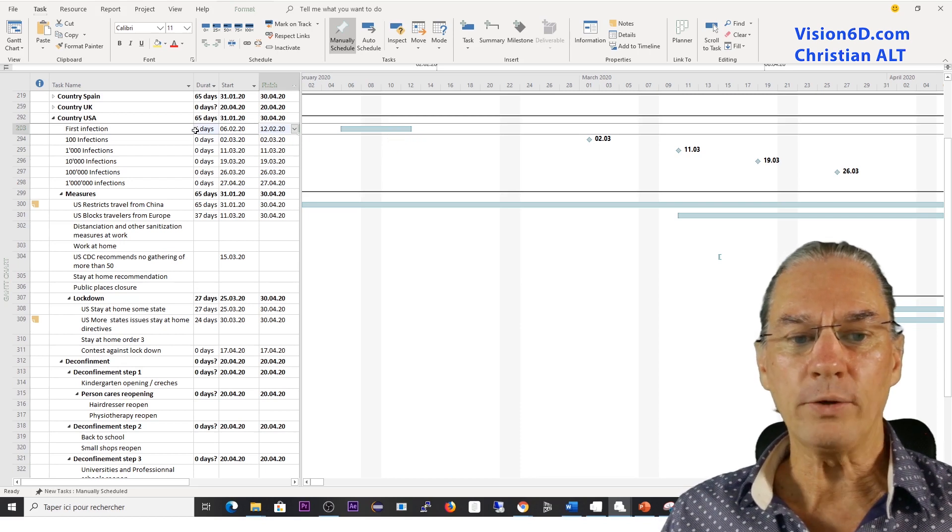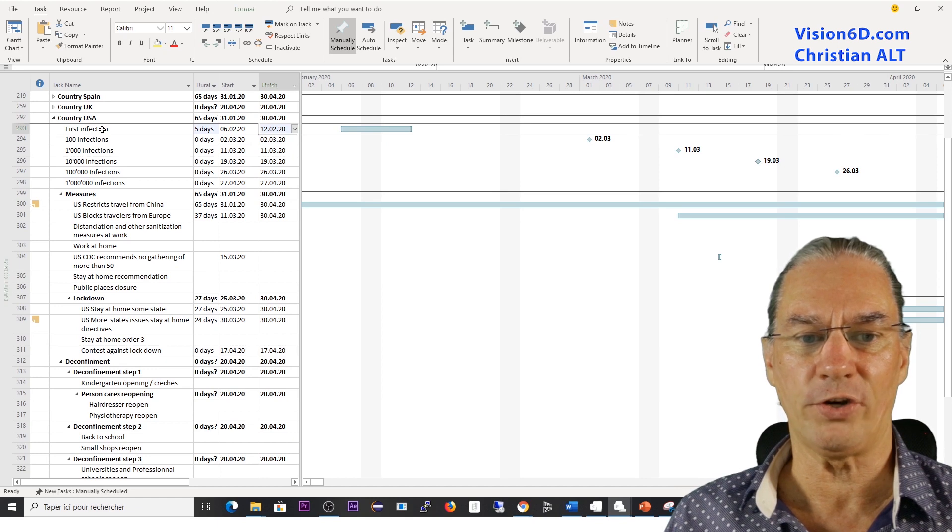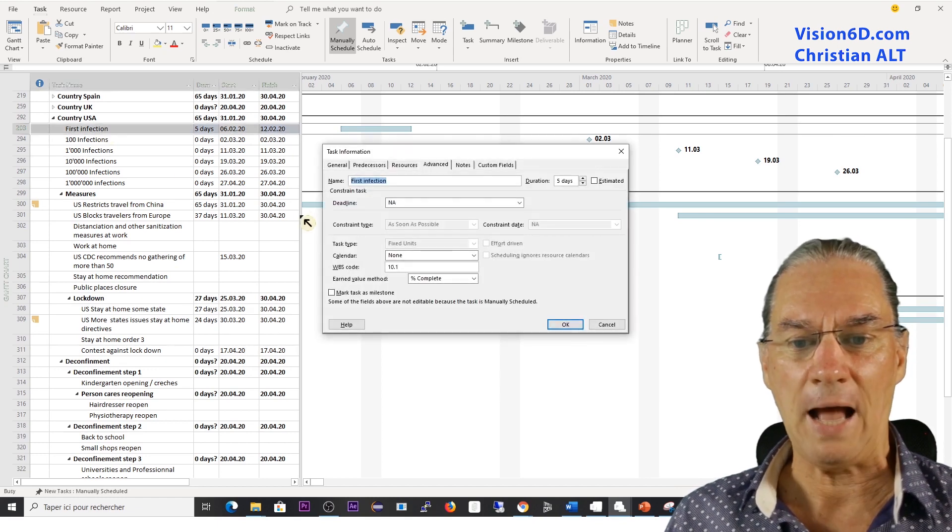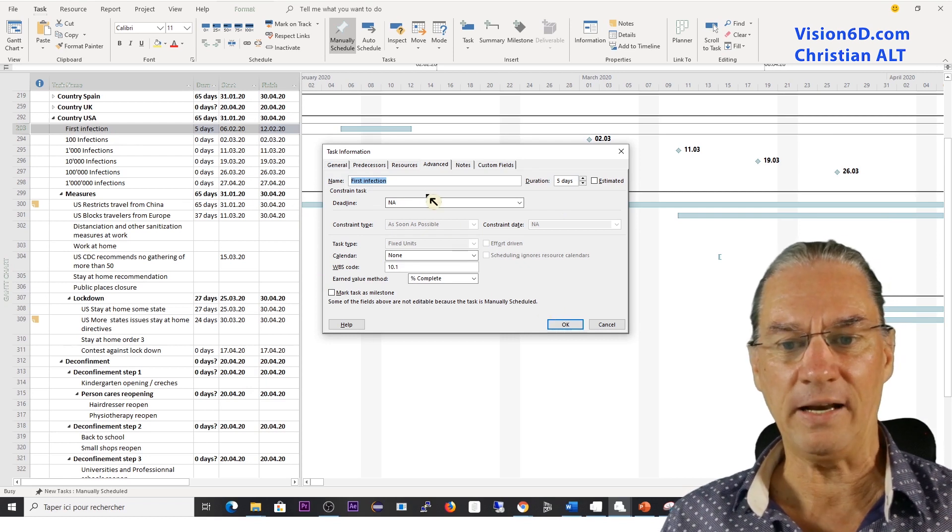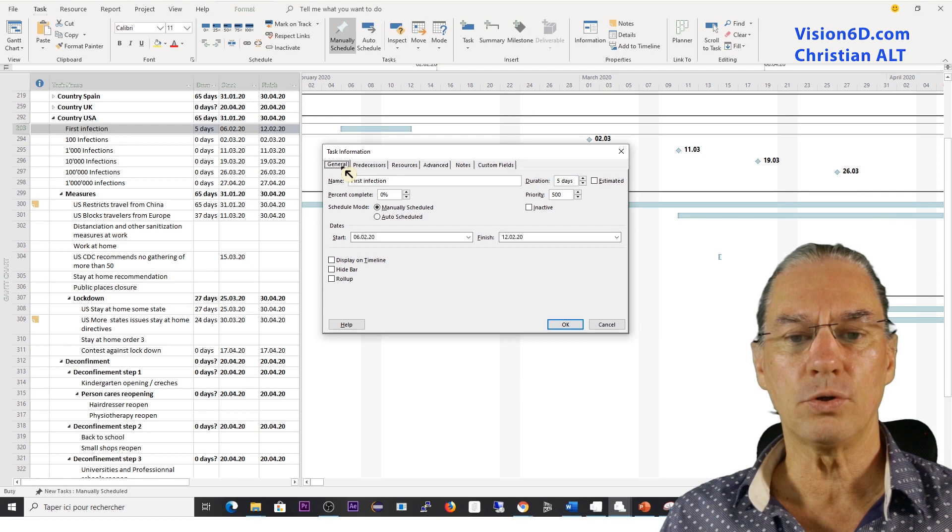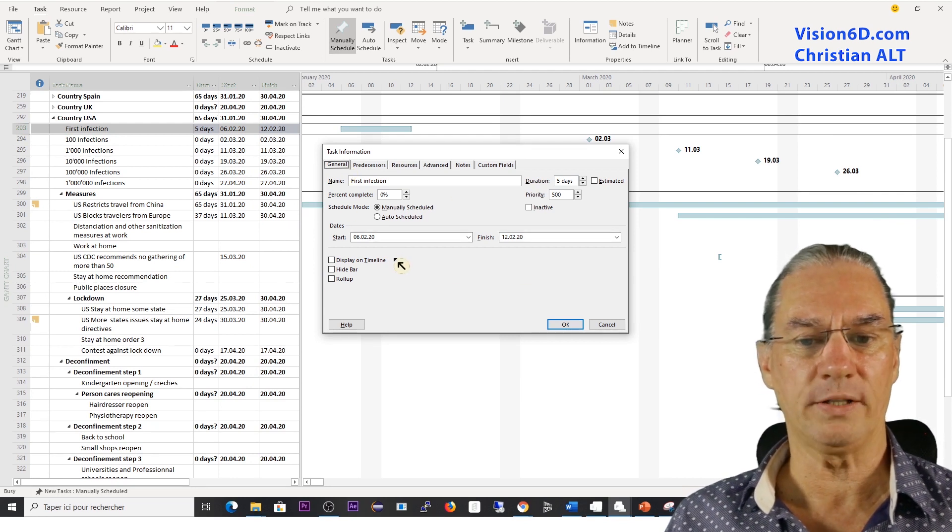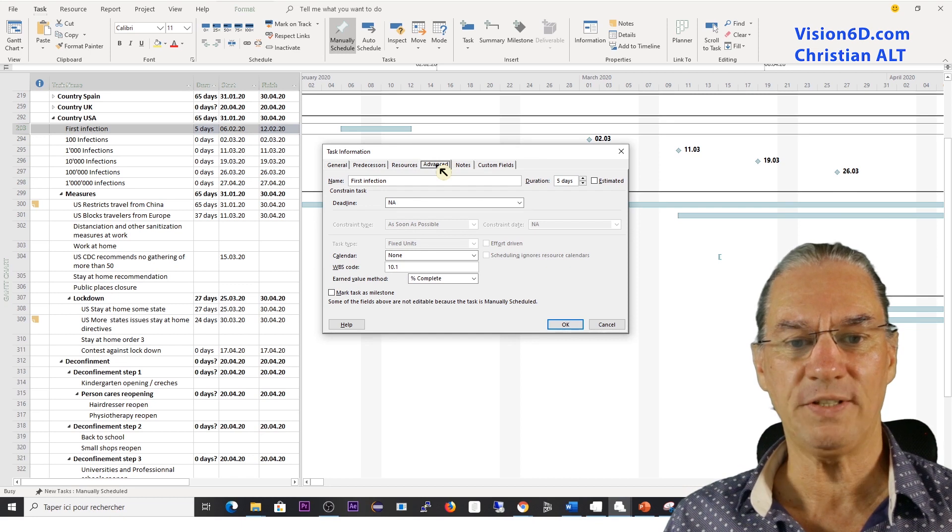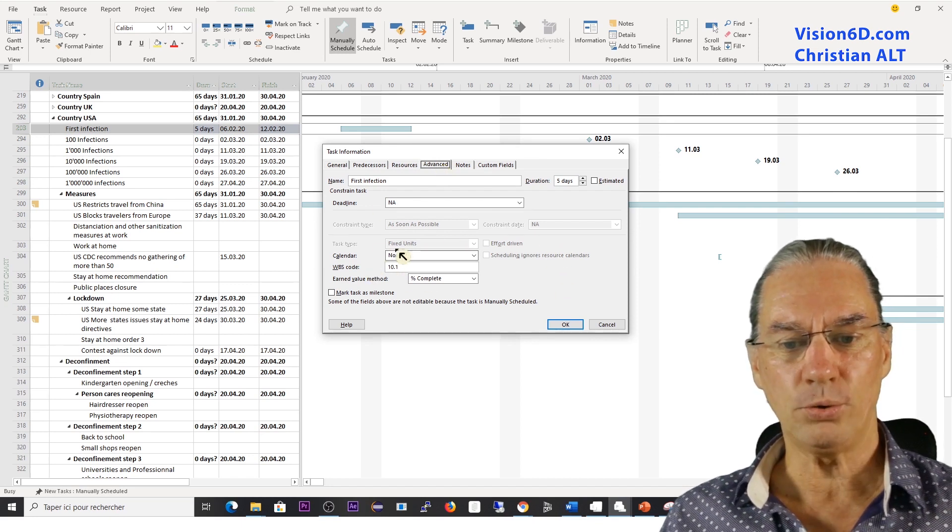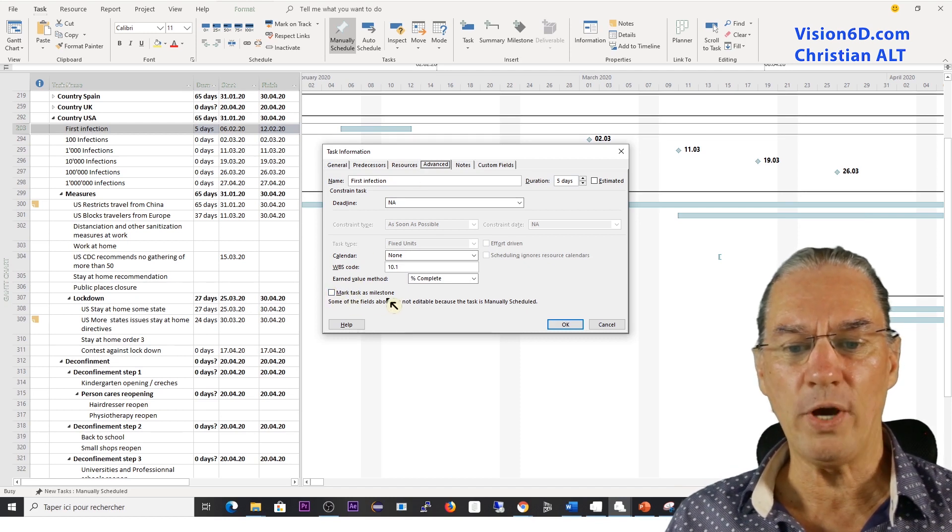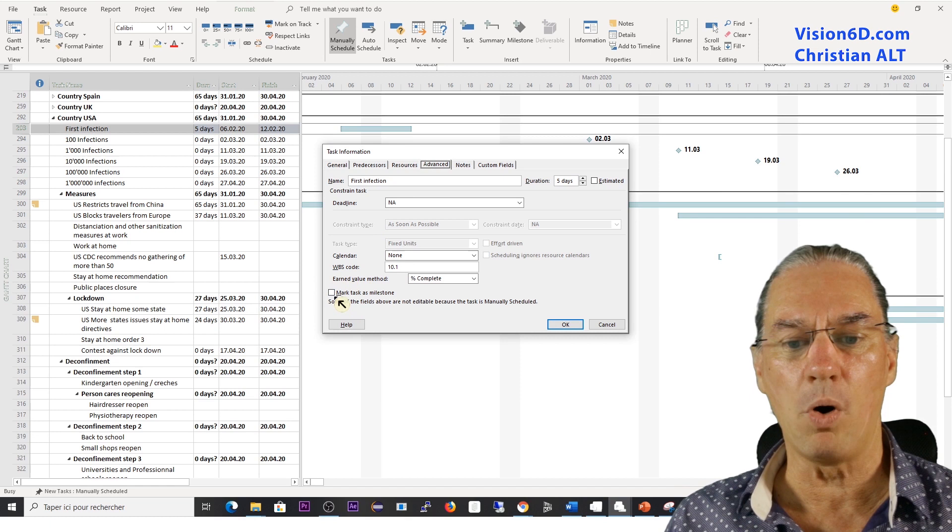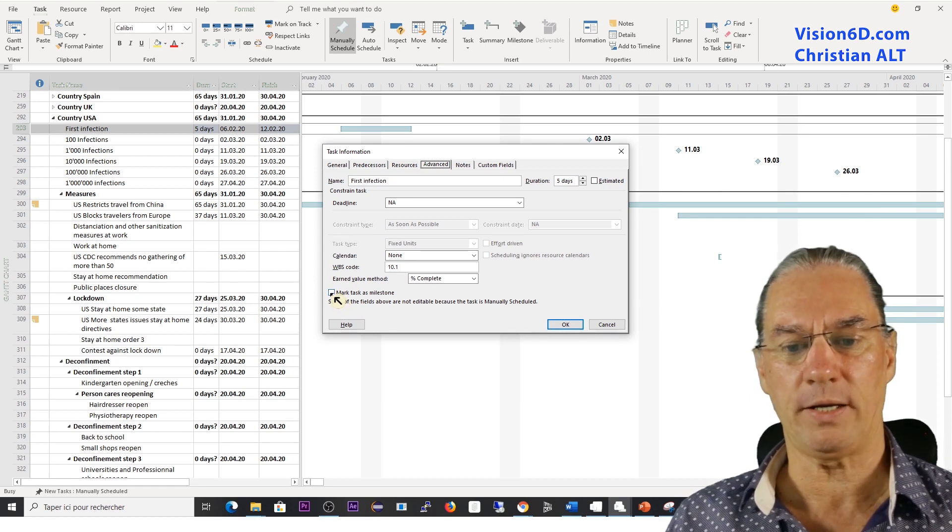What I want to show you is that by double-clicking on the task itself, so the first infection, I'm opening the information about that task. And I will now go to advanced. You see here down, you have a checkbox where you can mark that task as a milestone.